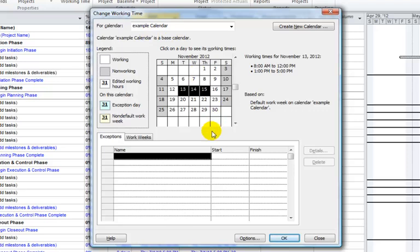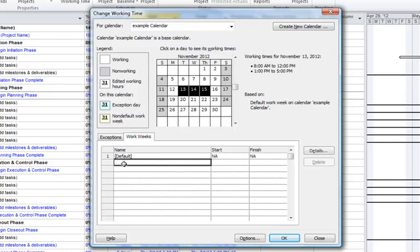The Change Working Time dialog box has two tabs — Exceptions and Work Weeks — which are used to define the working and non-working times for the calendar. The Work Weeks tab defines the work schedule that you follow week after week, including working and non-working days and work hours. You can have multiple work weeks if you work different schedules at different times of the year. For example, in the summertime you might have a shorter work week, or for a specific resource working a different schedule that you need to define.